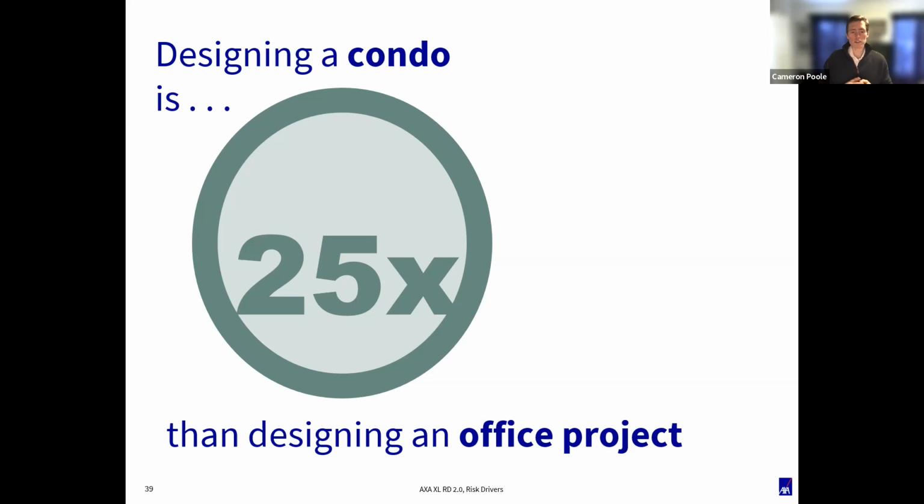The other thing too is in multi-unit buildings, you might be working on a condo building with 50 units, 100 units. Well, you've made an ADA mistake or an issue in one of the units, but now it's an issue in 50 units or 100 units, right? So those claims balloon into much larger amounts on those projects. So condos overall are a much higher liability area. Mostly where we see the risk is the bigger condo projects.